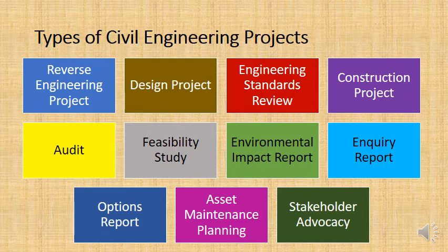But it's going to create a big lake, which is going to flood everyone in Barzan. Now, those people in Barzan, they may say we're being overlooked here. And so they may actually hire an engineer to argue their case, to say, look, if you build this dam, you're going to flood these people, and that's a very big external cost. And then they will either alter the dam or they will pay to have those villagers moved.